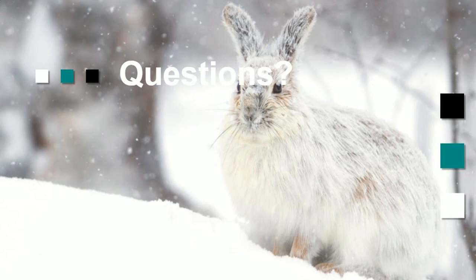And usually you're not right down to the person in the reporting necessarily, unless there are a few specific people who can become crunch points for sure. So yes, although we showed you a resource, you can certainly use the roles as well. And you could use role codes, resource codes. Now that's in the newest version. We've got role codes. We also have resource assignment codes now. Okay, so they've added some new features there to make the resource reporting even stronger.